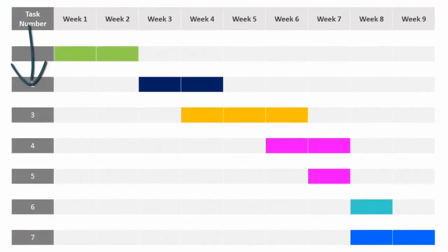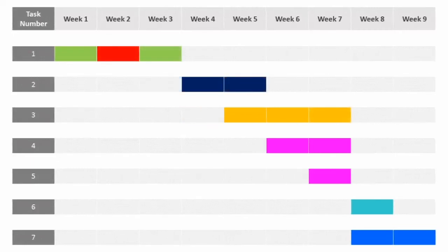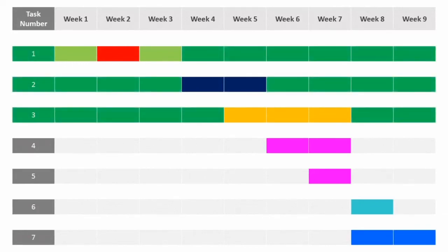Now you have a clear idea of the order of things, you can start filling in your Gantt chart, showing the order of activities, where things can happen at the same time, and where one task must be complete before others can start. Once you have the Gantt chart designed and agreed by everyone on the project, you can use this one document to keep your team, stakeholders, and anyone else interested informed of progress. Simply update the chart to show schedule changes and their implications, or use it to communicate that key tasks have been completed.